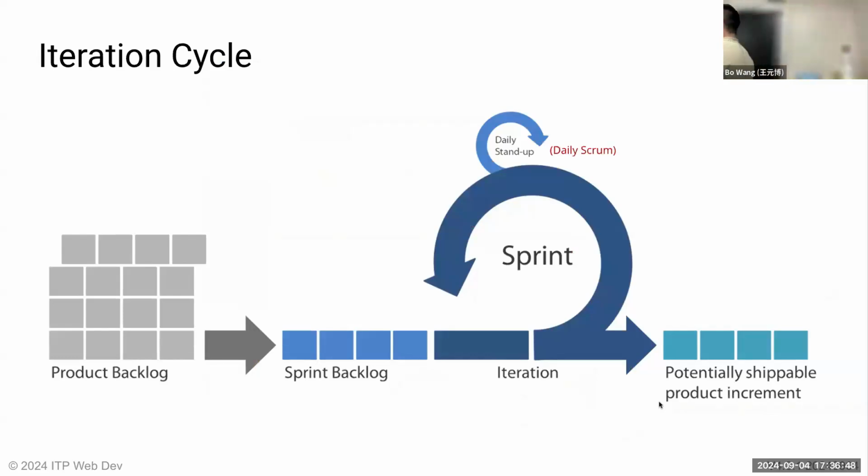So this is a more detailed breakdown of the sprint process, what we're going to do, right? Today's assignment is basically just starting a sprint and making sure we do it the right way. To bring it into the actual sprint details, we'll have a product backlog, which means a bunch of things that we need to do. And then we'll pick what we're going to do for this week, prioritization, right? Once we prioritize, we start the sprint. We'll start the development, the design, the entire work in progress.